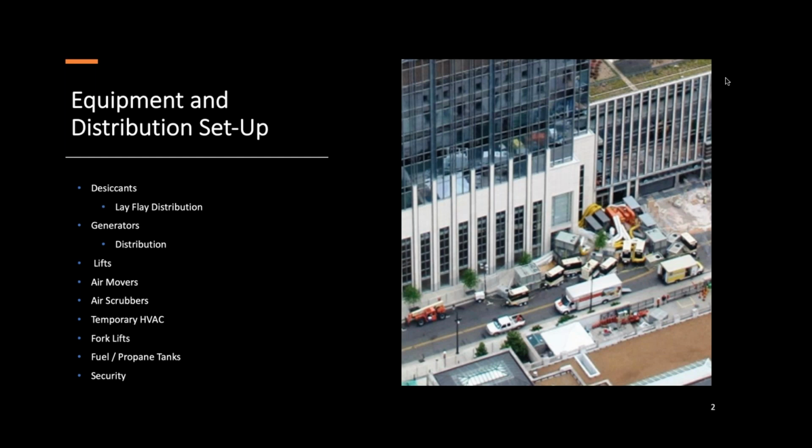A drawing plan as well as a setup plan should be written and mapped out before the equipment arrives. So while the equipment's on the road, as I talked about last week, your project manager, your senior project manager is already there.